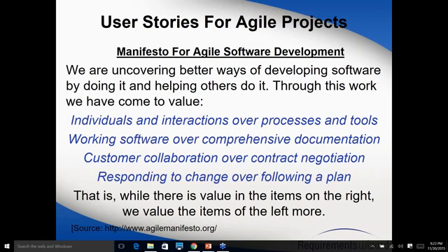I'm not saying we won't do it. We will do some impact analysis, and based on that we will say, okay, we cannot do it in the immediate sprint, but we can do it in the next sprint, or maybe two sprints down the line. So it's more of a collaboration and communication that happens between the customer and the Scrum Master, and based on that you work with your customers.